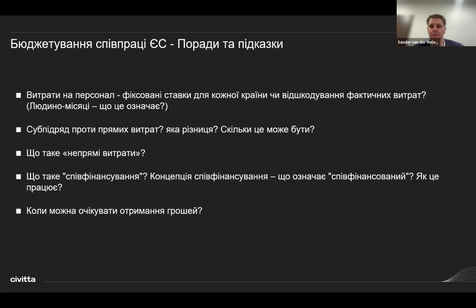Subcontracting is something different. So subcontracting means we have a certain task, activity, a coherent group of activities to be done in the project. And our organization, we don't have the capacity for this. We don't have the expertise, the availability of people. We ask other organizations, and typically you ask it through procurements. That depends a bit on the rules locally, but also in the international projects. We ask another organization to implement these activities and take the full ownership of the activities. That is considered subcontracting. So it's important to understand what is subcontracting and what is other direct costs, external costs.